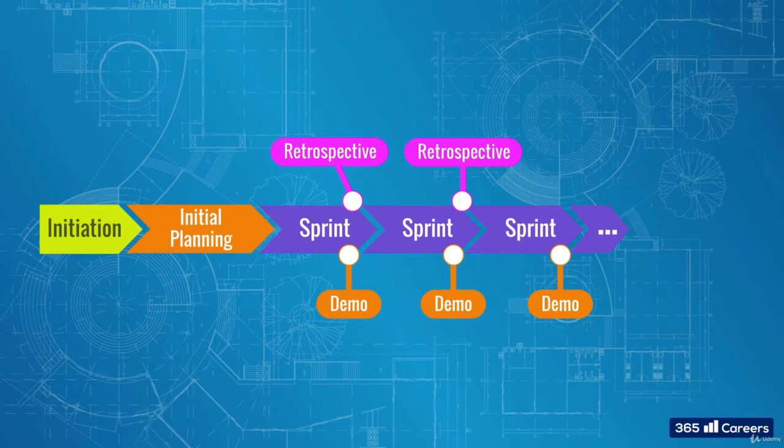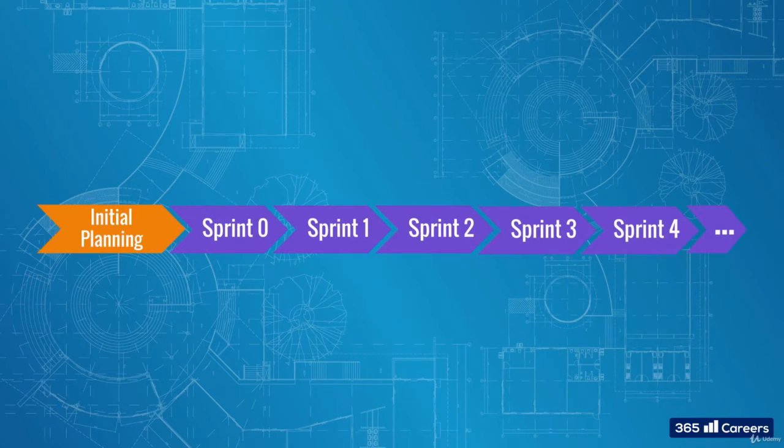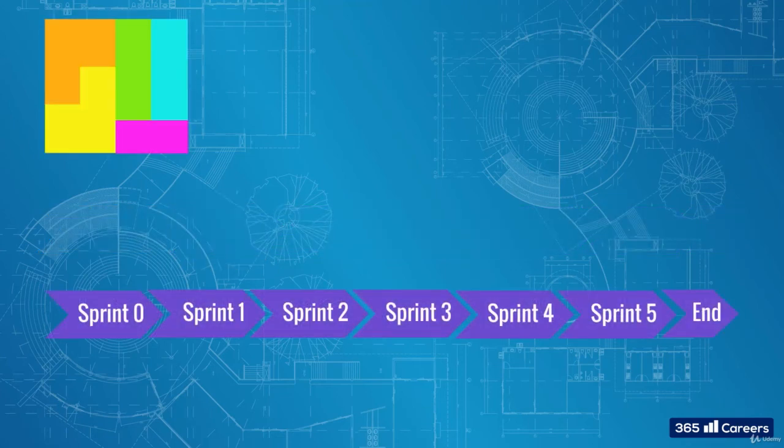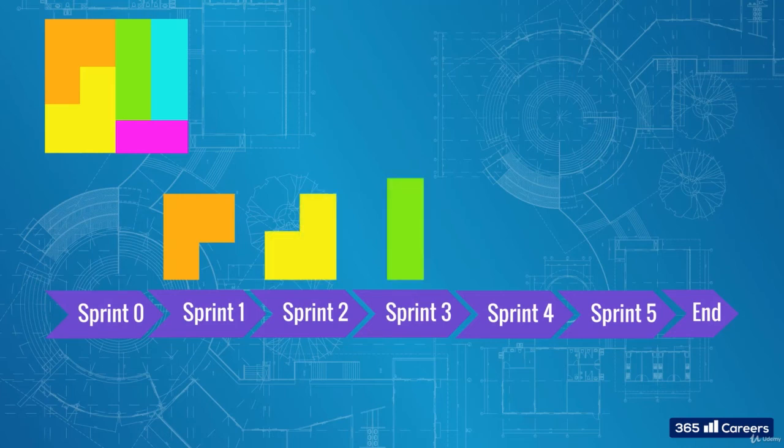We explained that a certain amount of planning takes place before the sprints start. The knowledge that the team has at the end of it has to cover what the scope or product will be. Before the sprints can start, the scope has to be allocated to the different sprints. This exercise is usually performed between the initial planning and the first sprint and is called Sprint 0. A plan is created, indicating how many tasks per sprint the team is targeting to achieve, which parts of the product to create first, which ones second, etc.